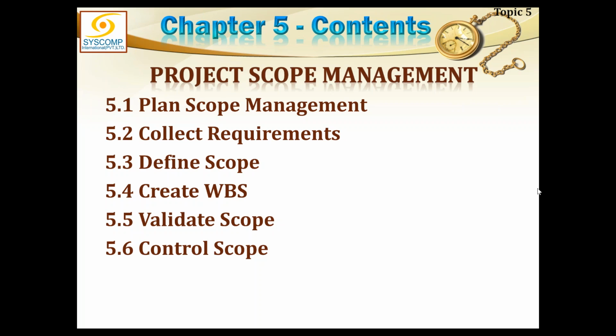Sir, execution should start. No, we need to get the total scope approved by the boss. And what do we call that? Baselining, sir. Baselining. And you remember that we needed to have a baseline, especially for three things: scope, time, and cost. We said all other knowledge areas may live without a baseline because whatever changes come in any other knowledge area will ultimately impact either scope or time or cost. And here we are discussing scope. So the last process of planning scope would result in a scope baseline.